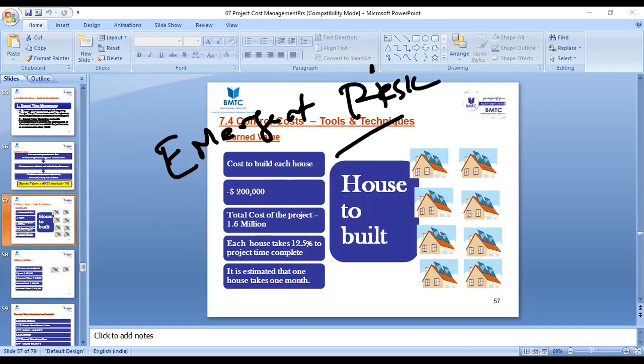What happened? A risk is emerging from the project once you have executed the work. You will not bring that risk into the risk register? Yeah, we will update the risk. For that, what are you going to do? You will assess that risk and develop your responses. The response which you develop will be a contingency. That's the proactive approach, right?